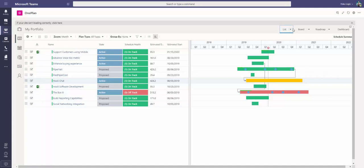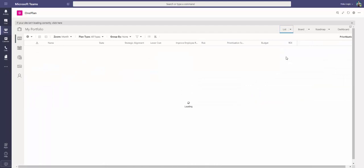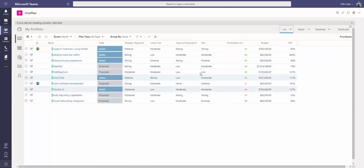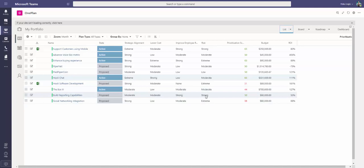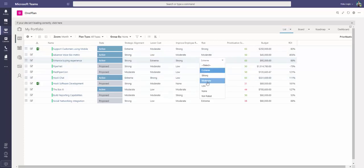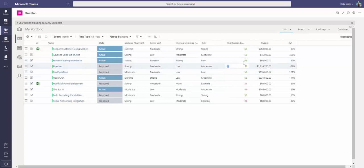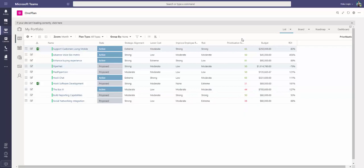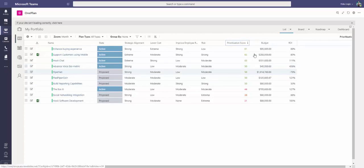We even have prioritization views, and whatever prioritization method you would like to use, we can look at views like this. And in this case, I'm looking at drivers and how well we're aligned with these business drivers and have them calculate into a prioritization score. For example, I might go into a particular project and say that the risk is actually now low. And by that determination, it would then update this project and its score accordingly. I can then rank by these scores, and this could be a common way to value and prioritize projects within your organization.